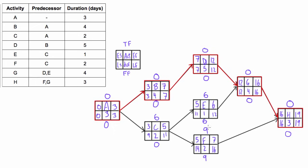For activity E, which is not on the critical path, we have 6 days we can delay it before it affects the end date of the project. If you delayed it by up to 6 days, instead of an early start of 5 you'd start at 11, finish on 12, bring that 12 up to G's predecessor, and you wouldn't affect G's start date — so G would still end at 16, and H's end date is unaffected. The free float of activity E is also 6 because free float is the amount of time you can delay an activity without affecting the earliest start of any of its successors. If you delayed E by 7 days, you would affect G's earliest start, which is why the free float is only 6.